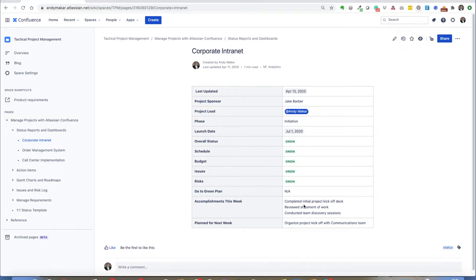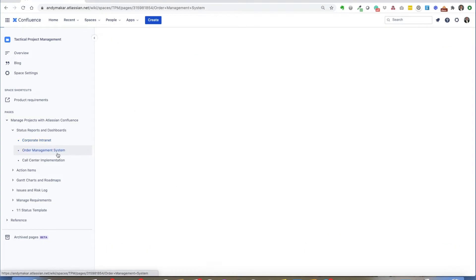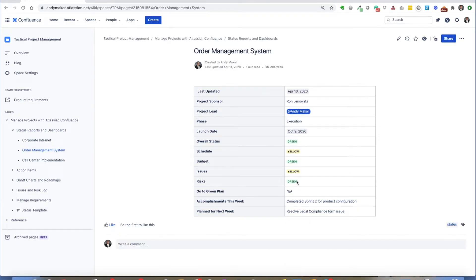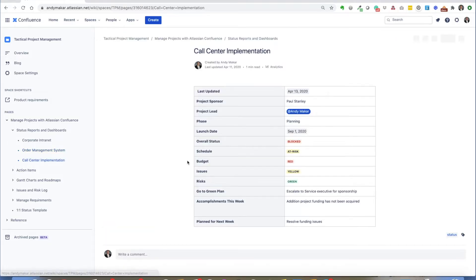If the project was red, I could put a go-to-green plan. I could also highlight what the major accomplishments are this week as well as what's being planned. In execution, each of the project leads or project managers would complete a weekly status report within Confluence, and you see here I have different status reports which may be red, yellow, or green depending on the health of each project within the given program.